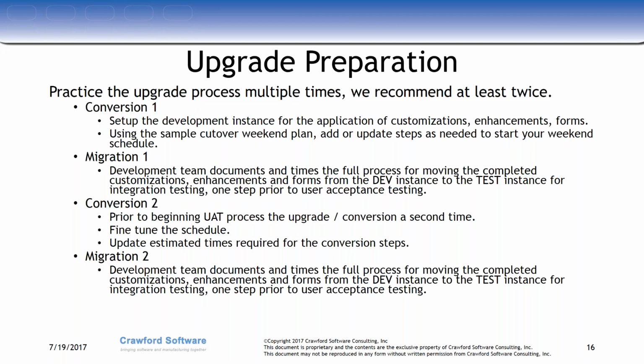The upgrade preparation, moving into the next steps. So we highly recommend that you process the upgrade multiple times, at least twice if possible. And this just helps you, and you'll see it again coming to some of our detailed scenarios a little bit later on. This is going to help you do that time estimate. What's the upgrade weekend look like?